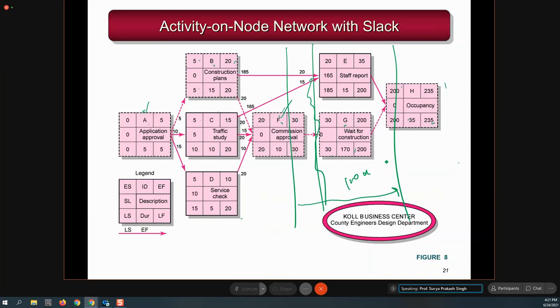Now can we finish the entire remaining thing, or what is the amount of time the entire project will go, 100 days, or can we crash the project, so that the slack here, the manpower that we can put here, we put that manpower on the activity that is critical, so that we can minimize the delay. Whatever time of 100 days got wasted, we can minimize, so that the wasted time of 100 days is made up to, say, 60 days of work by crashing. In this way, the project manager can actually ask for more resources, more machines, more manpower, and can increase the working time. Work that was 12 hours can be made 24 hours. In this way we can manage it.